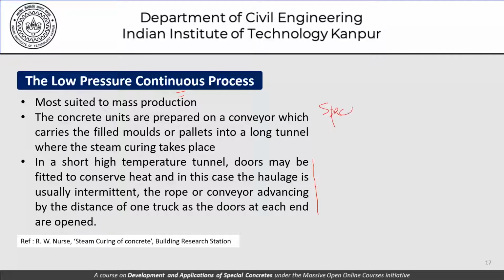That what is the kind of length that we will require, what is the kind of area that will be required to accommodate a certain number of stacks. So if this is our member size, we have to have some operating space in between. Recall the picture that we saw for the sleepers, and then we decide that okay, this is the kind of space that we will need as far as storage of these facilities is concerned.